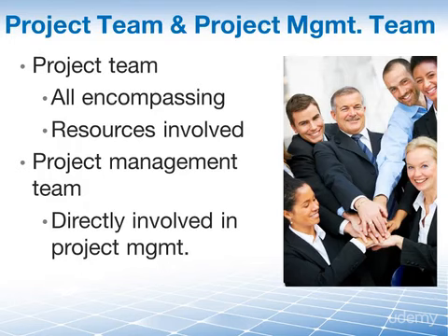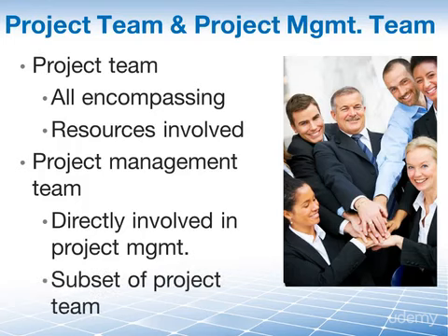On some smaller projects, the project management team may include virtually all of the project team members, because everybody on a 3-person project is probably somehow involved in project management activities. Yet on a 3,000 people project, you may only have a small group, a subset of that. The project management team, therefore, is a subset of the project team, and they are responsible for the project management activity. So not the whole team is responsible for planning, controlling, and closing. Only the project management team is responsible for these activities.